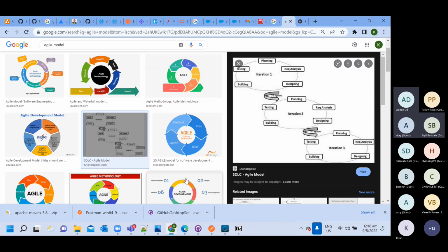So generally the Scrum Master will have the role of team collaboration. And the Scrum Master will be responsible to identify how many stories we are going to cover in this particular sprint. They will decide based on capacity. This works on a capacity model. So for example, you have 10 resources in the Mulesoft team. For each resource there will be one capacity. A few resources will be very senior, with the capacity to complete 10 stories.